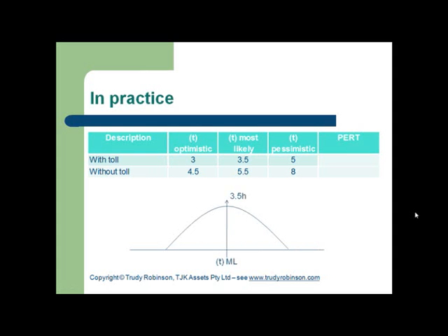In your mind's eye, you'll already understand that the most likely timeline is 3.5 hours, the pessimistic is 5 hours, and the optimistic is 3 hours. Having the mindsets that we do, we would look at the most likely timeline, but we would add a small amount to accommodate extra stops, unknown circumstances, mechanical issues, etc. So we would usually take the most likely and add a small amount to give ourselves some leeway. This is the principle of the PERT analysis. It takes these three calculations and uses a standard formula to give that extra leeway.